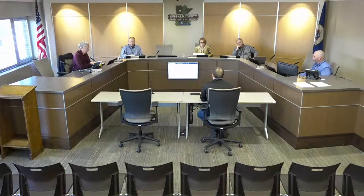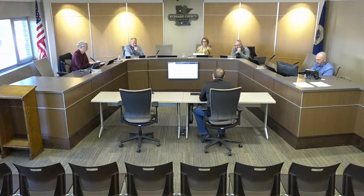So then going in the government center, this is actually our first area of construction. As soon as we get plan review comments back or plan review complete by the state, we want to get going on this. So the intent is right away on March 17th to get going on level 2, right below us, to renovate all that area in red. And moving down, once that's complete, we'll go into level 1, and this is a 3-phase project as well to keep office space for the personnel.